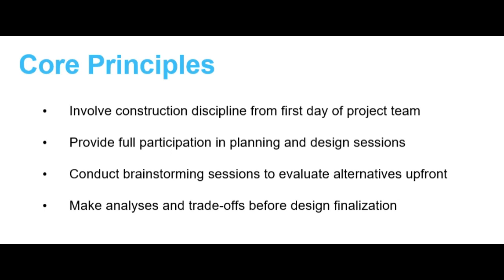One is involve construction discipline from day one. Construction engineers sit at planning meetings, not on sidelines. This means the project team should include people with site or field experience right from the first planning and concept discussions, not only after drawings are finished.